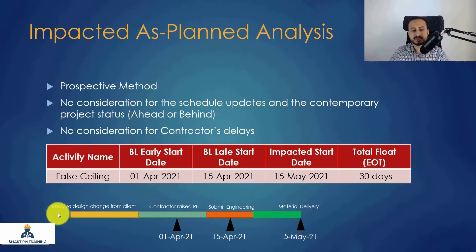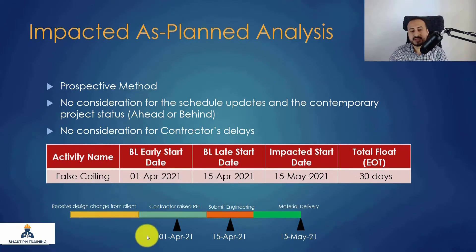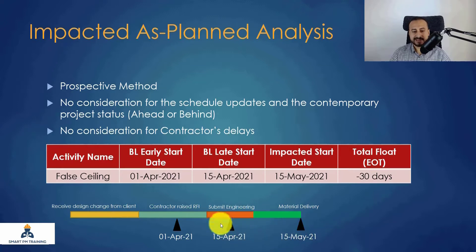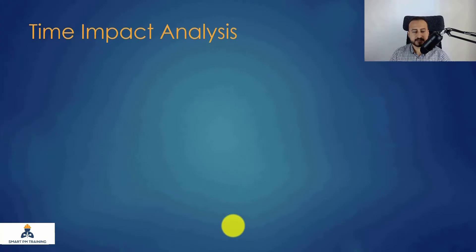Finally we had material delivery. An event can start way before the early start date and you can still claim for it, because the consequences of the change will last longer and will go beyond the late start date. Because the material delivery occurred on May 15 — only one month behind the late start date — this is the basis of the EOT claim.